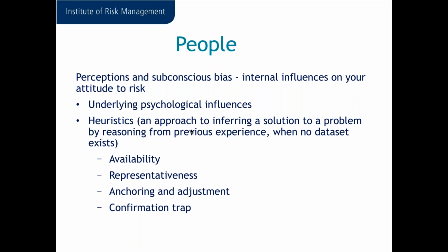So just drawing on a small part of that data that's available, the main areas in the study material are around risk perceptions and something that's called heuristics. So heuristics are subconscious factors or subconscious bias that affects your perception of risks. And it's defined as an approach to inferring a solution to a problem by reasoning from previous experience when no data set exists. So you're just going back to what you've seen before and making judgments from that without taking into account anything else.